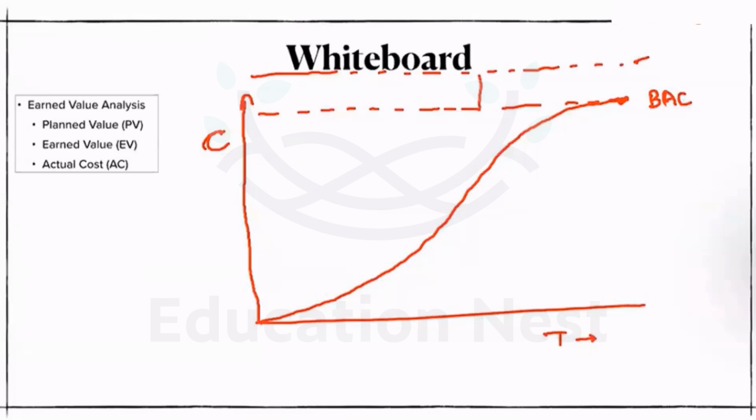What is this? This is the reserve that we talked about. Okay, so what happens here is the actual costs start moving above the budgeted cost. And the earned value that we learned in the very first slide is also lesser than the budgeted value. This is typically the case with every organization.